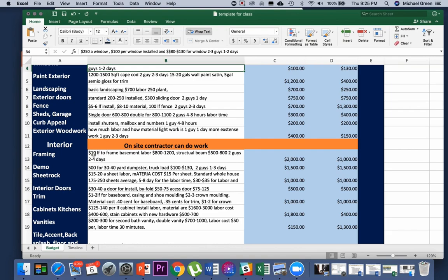So it's $10 a foot. We would pay someone $400 in labor to do that 40 feet. And now, materials are going to usually cost something close to that. So if you pay someone $400, you might say, okay, framing that 10 by 10 basement cost me $800. So again, we just want to get close and get in the ballpark.